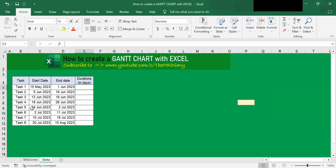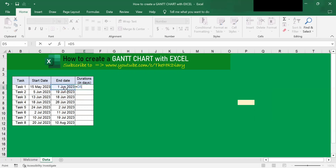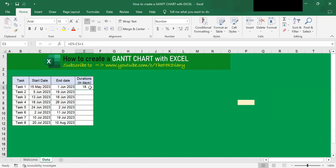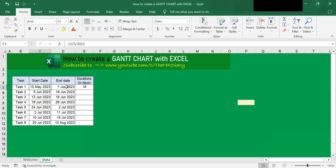So you type in equals, then you click on the end date, minus the start date, plus one. And when you hit enter, you get 18 days. So Excel calculates for you what is the duration in days from 15 May to 1st June. So the formula returns 18. This means that the duration for task one, which starts from 15 May and ends on 1st June, is 18 days.